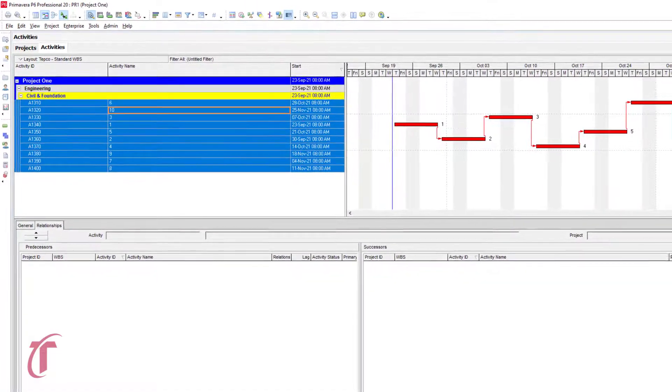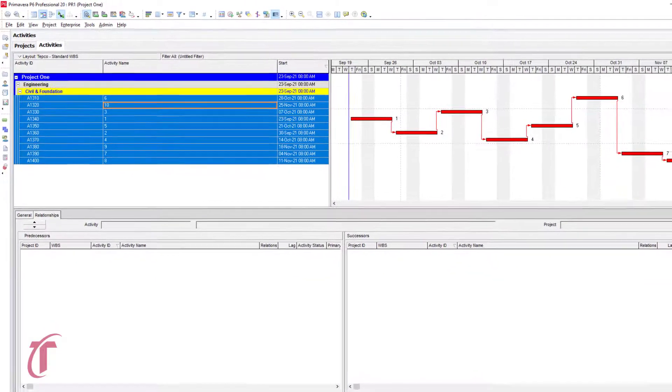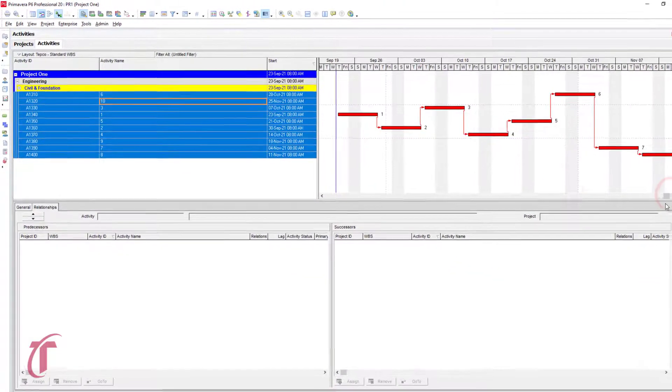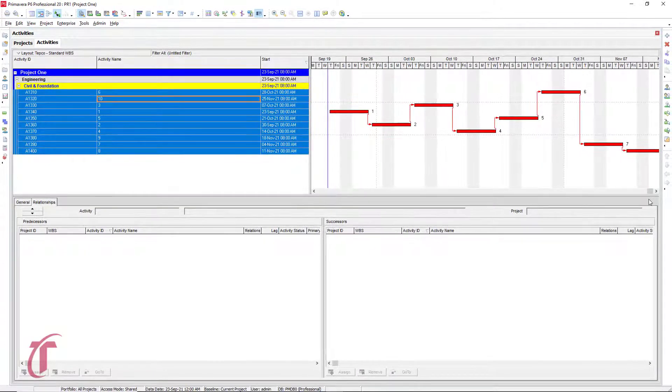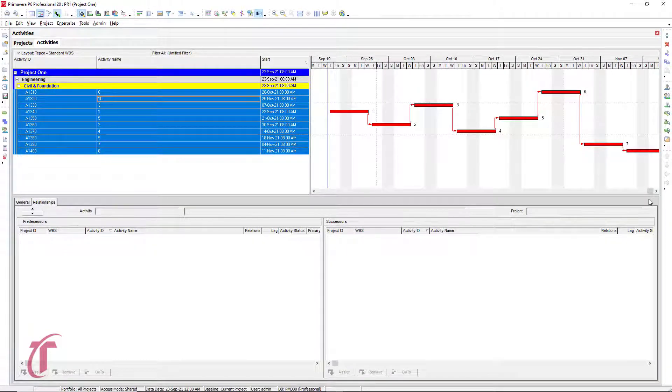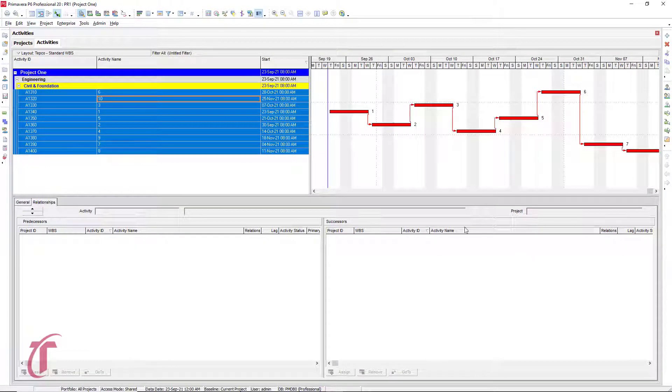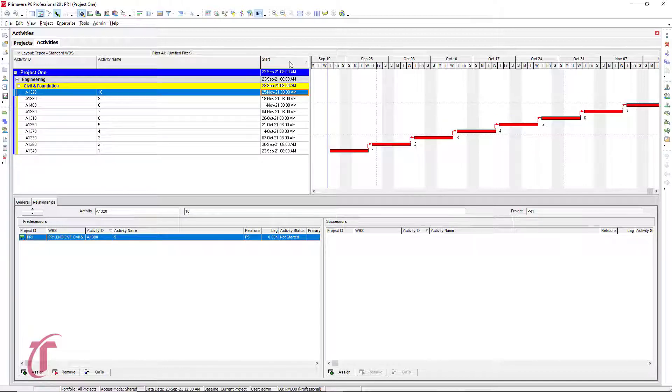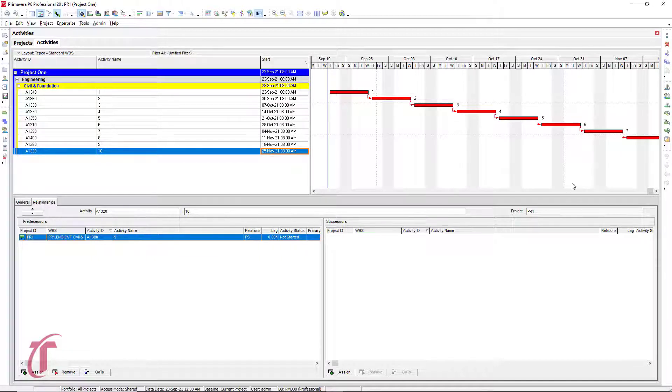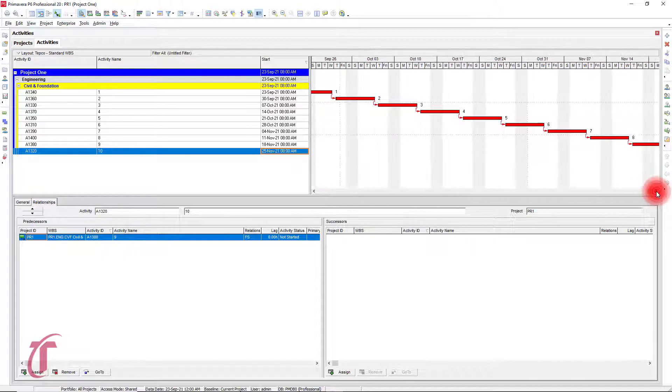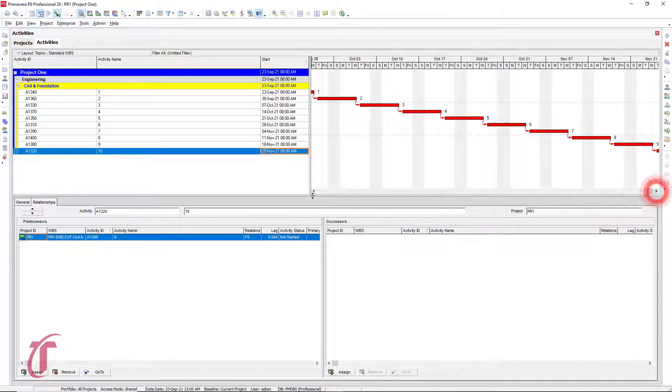And so notice we see that we have our activities that are linked, but they kind of look like they're all over the place. This is because of the way that they're sorted. So if we were to go to this column right here, this start column, and then sort our activities based on the start date, then we'll see this waterfall effect on the activities.